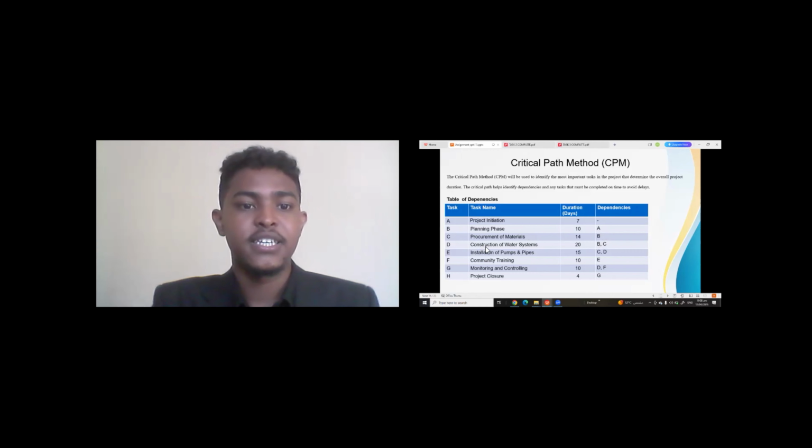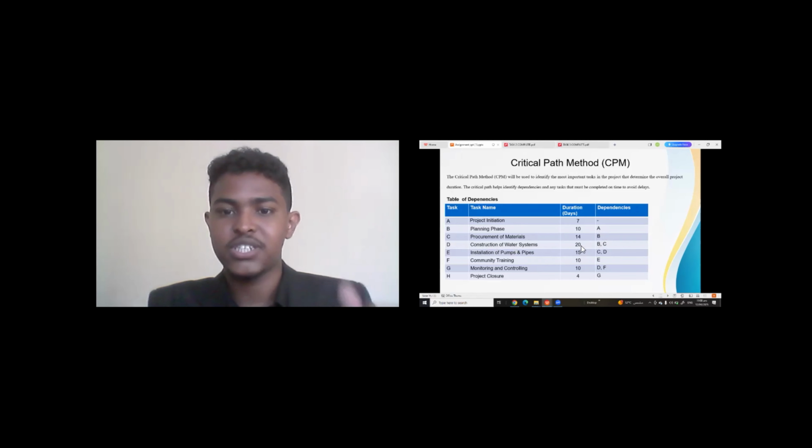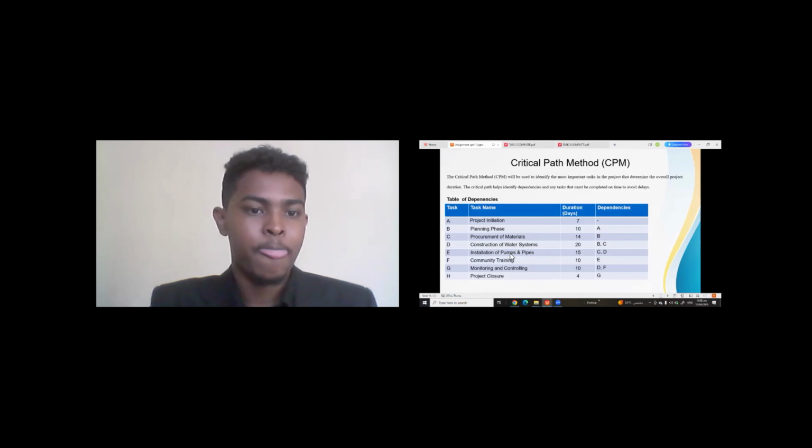D is the activity of construction of the water system, and it has a duration of 20 days. This activity has the highest duration, and it's connected to activity B and activity C. The installation of pumps and pipes has a duration of 15 days, and it's connected to activity C and activity D. Activity F, which is community training, has a duration of 10 days.